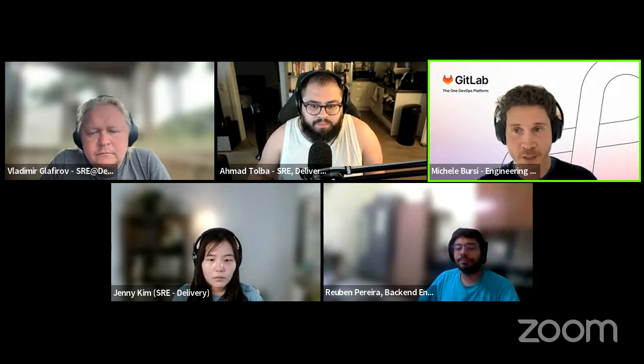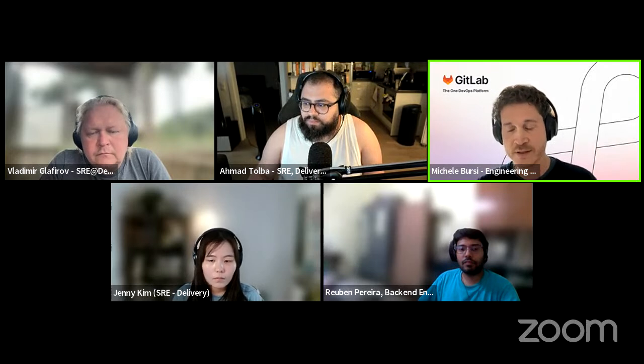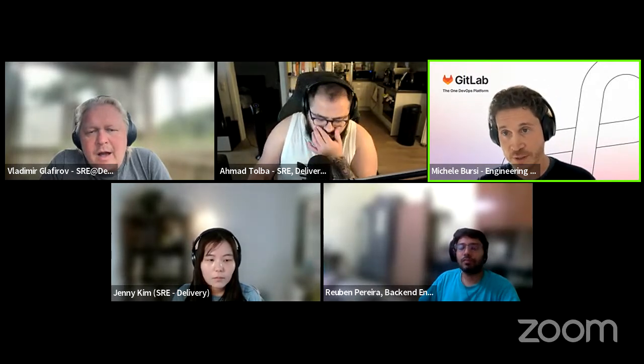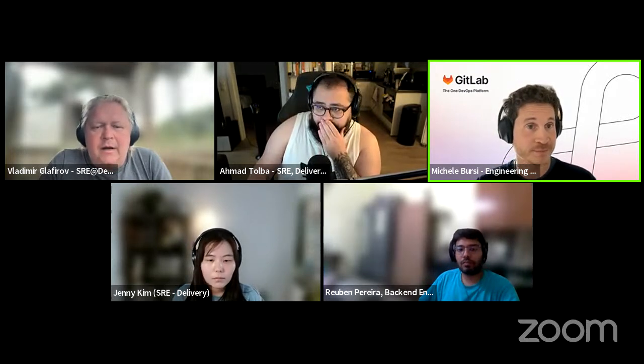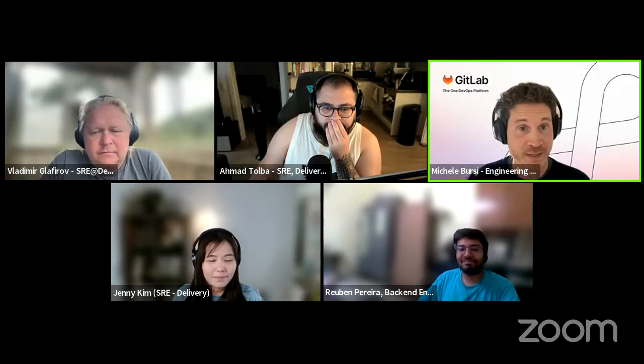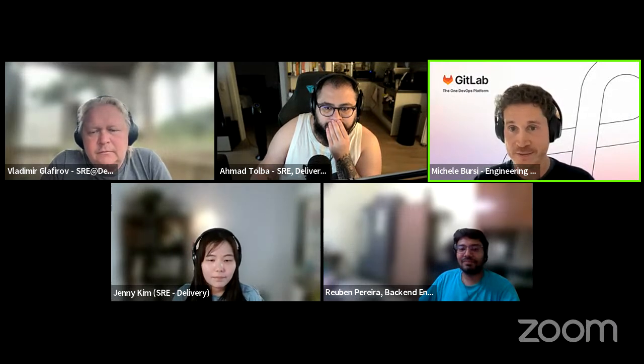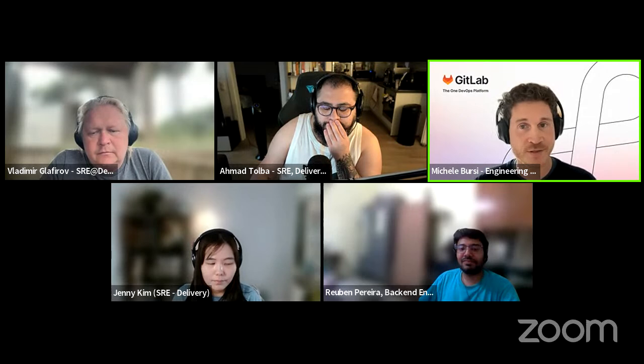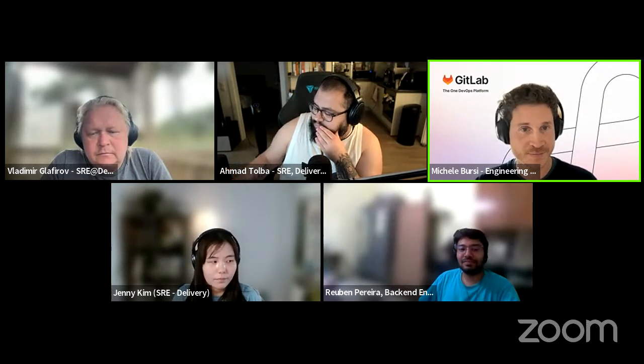So the OKR itself is about the capability of having clusters where we can switch traffic as our needs require. I wouldn't go all the way to have all the requirements, at least not for this quarter or not this OKR. Let's keep in mind, this quarter is only us. Scarbeck is out, the holiday season is starting, AI work is going to take a big chunk of us, and maybe we're going to get grabbed for some side projects for a bit. So let's keep it real.